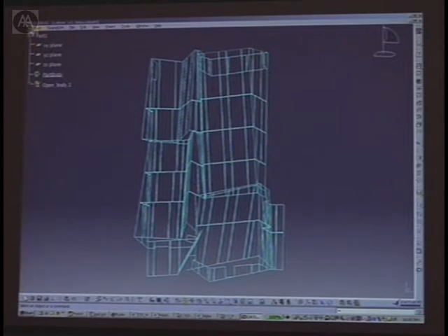So you're talking about, in each of these pieces of facade, about 120 different panels. We had about 7 of these facades wrapping around the building. You do the math. If you have to get some people to detail them at the contractor to do all the shop drawings and the shop tickets, basically you can't pay for it, right? Basically, you're not going to be able to design this way.